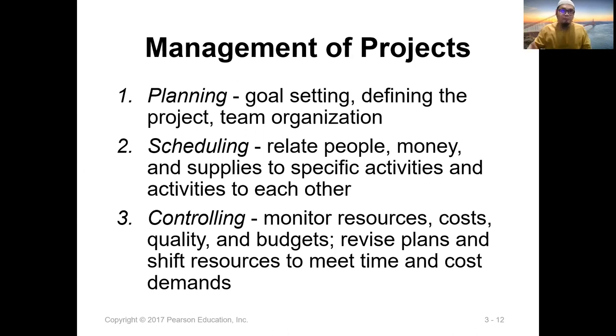The next column is the person in charge. We call that PIC. If you have experience, PIC stands for person in charge. Which people will handle this problem, can solve this problem? Which one is the best one? The best key player who can solve this problem. This is their responsibility to solve these problems. Okay, the last one is the deadline.